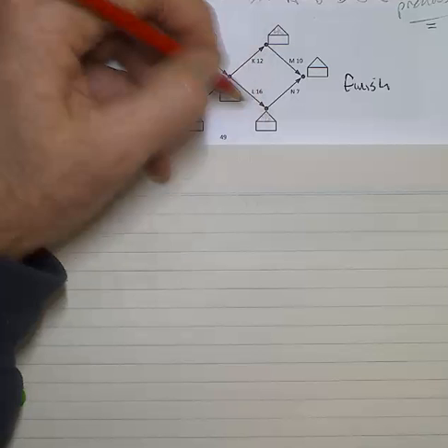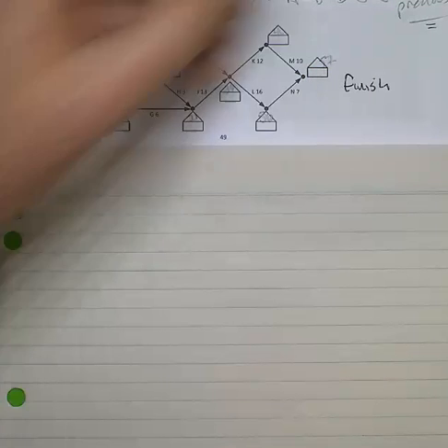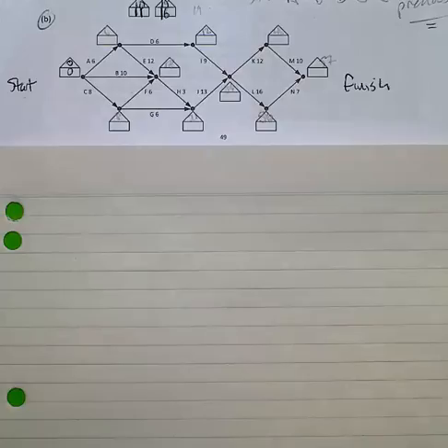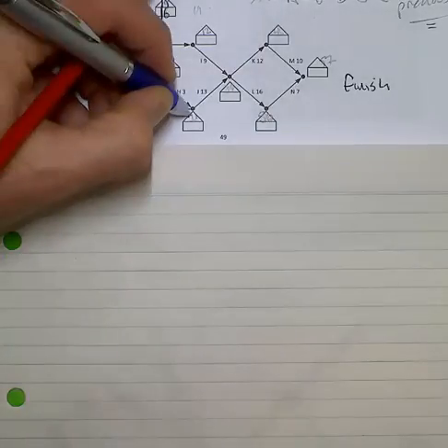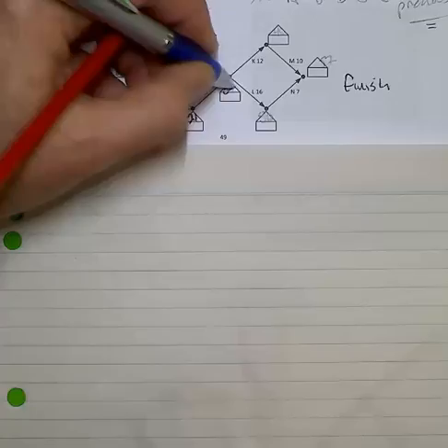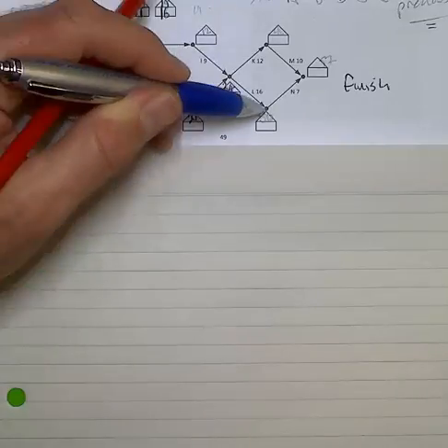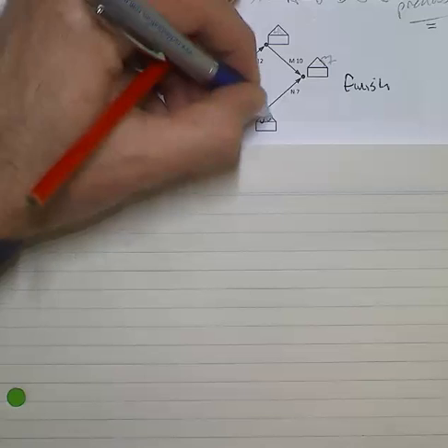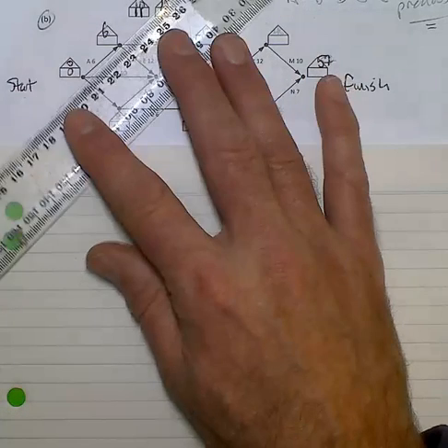Should just check that. It should be 50, sorry. 50, and that makes that 57. Now I think I now have the critical path. So A, E, H, J, L, and N, 57, will be the critical path. Mark that in.